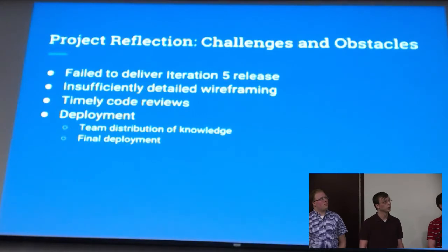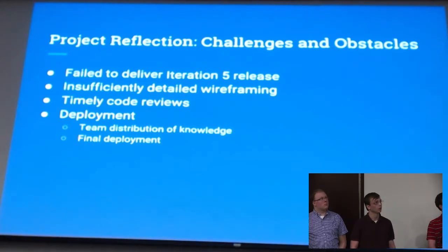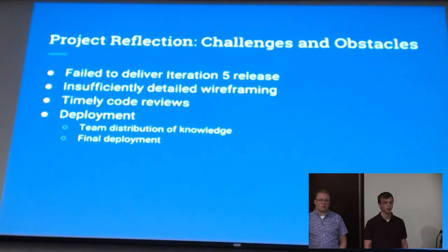We could have improved in some areas. At the end of last semester, during finals week, we actually failed to deliver one iteration release. This is because we took on too much development work, and we didn't estimate correctly how long it would take in regards to both developing and actually studying for finals. Occasionally, we had insufficiently detailed wireframes. This made it difficult when it came time to implement the UI. There was some uncertainty there, and we had to go back to the drawing board and start over.